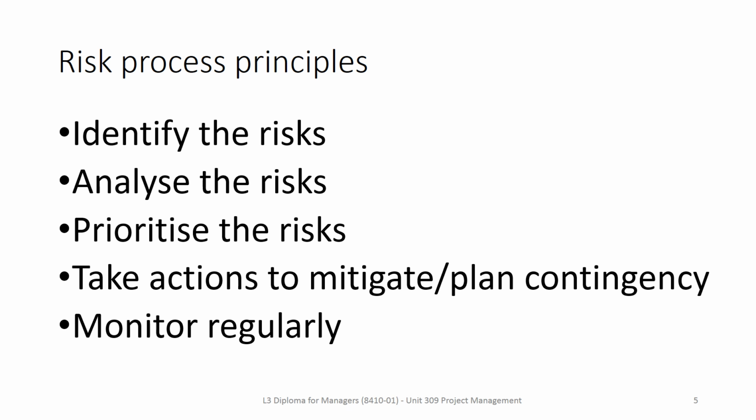The risk register is a live document and it needs to be reviewed at all project meetings, as secondary risks can occur at any time as we encounter issues, etc. So we need to keep on top of it.